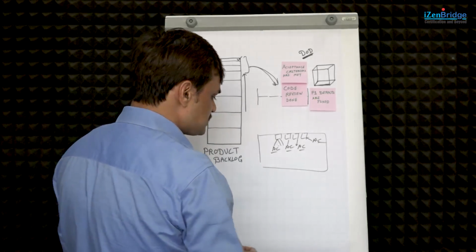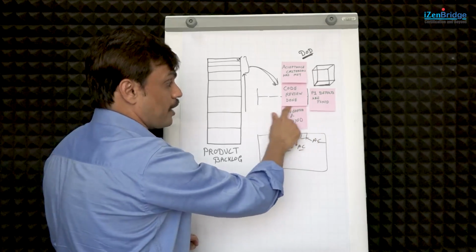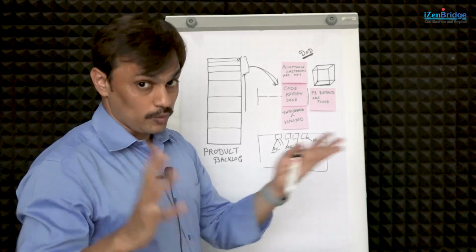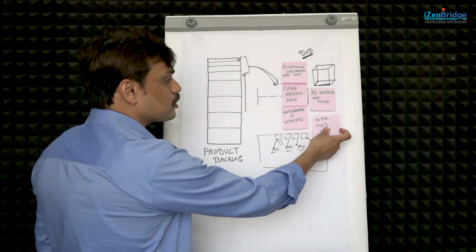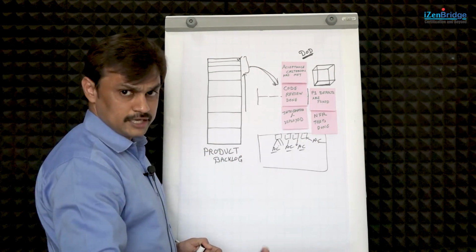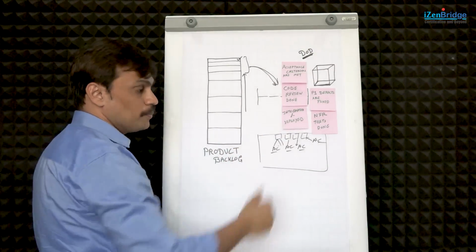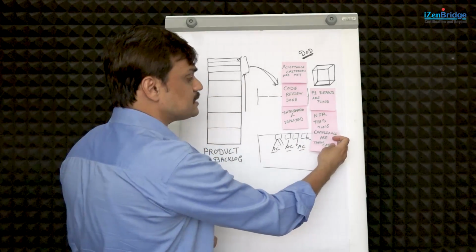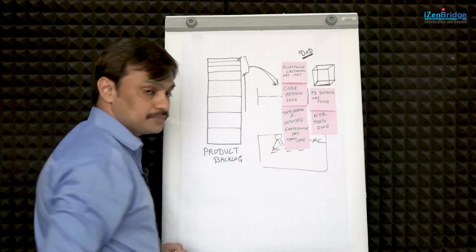You may have things saying the code or the user story which we have done is integrated and deployed, deployed to a particular server so that anyone can see it, or whatever your expectation is. That might be a part of a definition of done. It may include things like non-functional requirement testing is done. Maybe you have integrated test criteria which need to be tested, saying that before you finish a particular user story, non-functional requirements must be tested. You may have things like compliances are taken care of. You may have compliance documentation which needs to be completed before you can mark something complete.